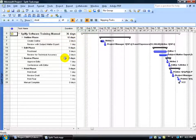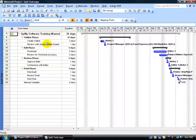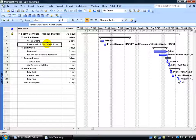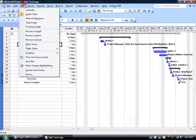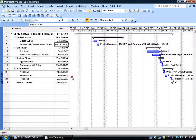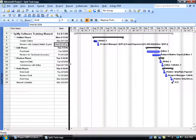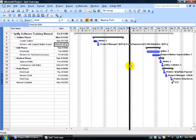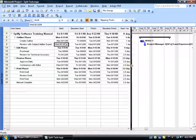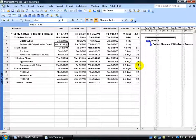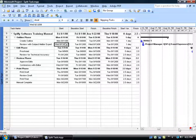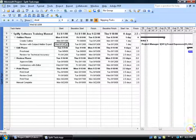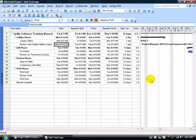Well, which is nice, but how many days have these tasks slipped? What I can do is change this entry table to the Variance table by coming up, clicking on View, going down to Table, over and down to Variance, and then clicking and dragging the divider bar all the way out here. And of course, I can scroll over here to see part of my tasks.